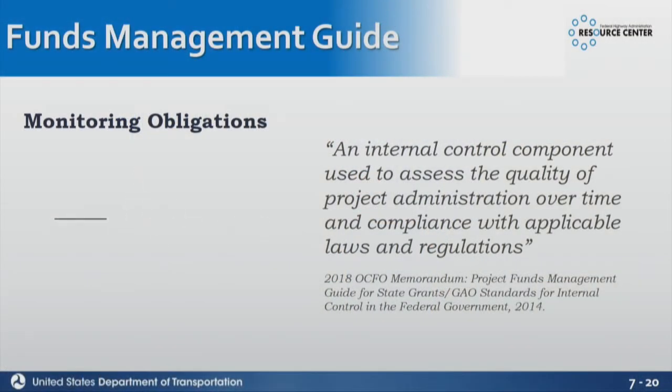Yep. Yeah, you can adjust your best cost estimate. As costs come in and are different, you can go up and down. So, our best cost estimate is usually based on a contract price if we're talking about a construction project. So what's going to change that cost? It's most likely going to be overruns and underruns, or changes in the design of the project that are going to require some additional costs to happen. But when you find out about those different changes, you should be making a modification to the project at that time and not waiting until the end or for a long time.